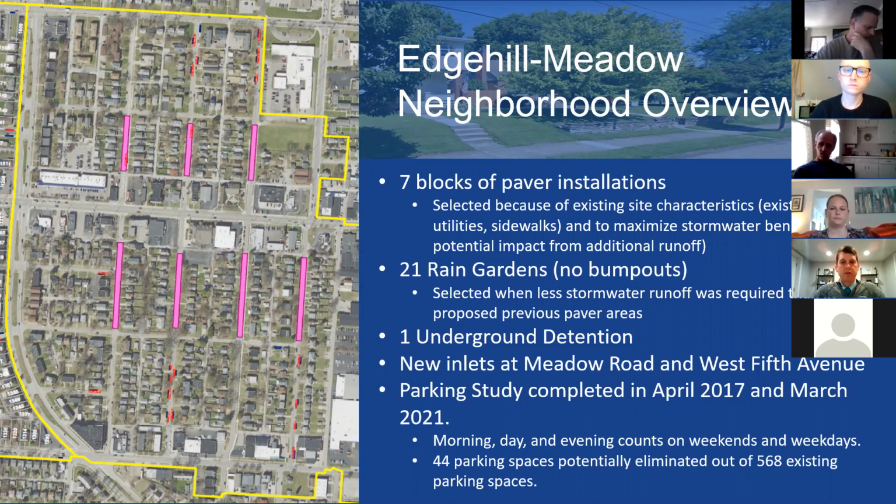As part of every project, one of the blueprint requirements is to complete what is called a parking study. So what we do is we go visit the project site on multiple nights, on mornings, middays, and evenings, on weekends and on weekdays, and count the parked cars or vehicles utilizing existing parking spaces throughout the project area. This helps us understand a baseline of parking utilization throughout our project areas to help better inform the locations of our proposed improvements and try not to impact parking in a negative way.